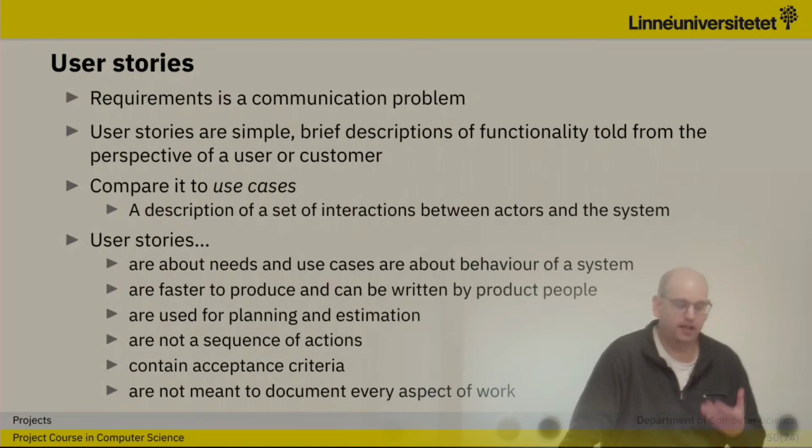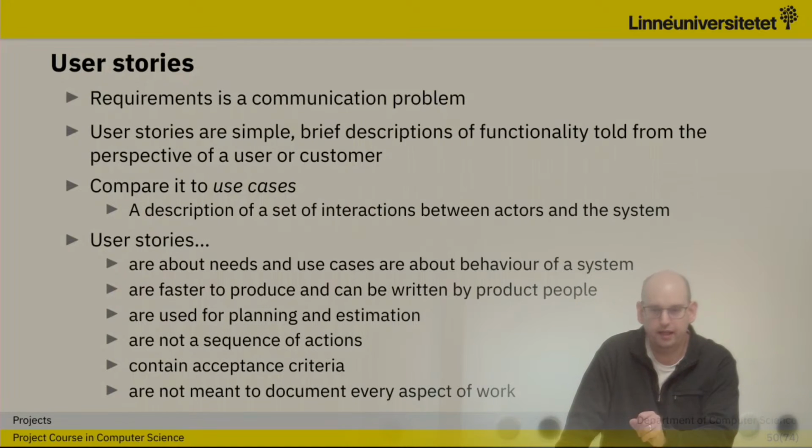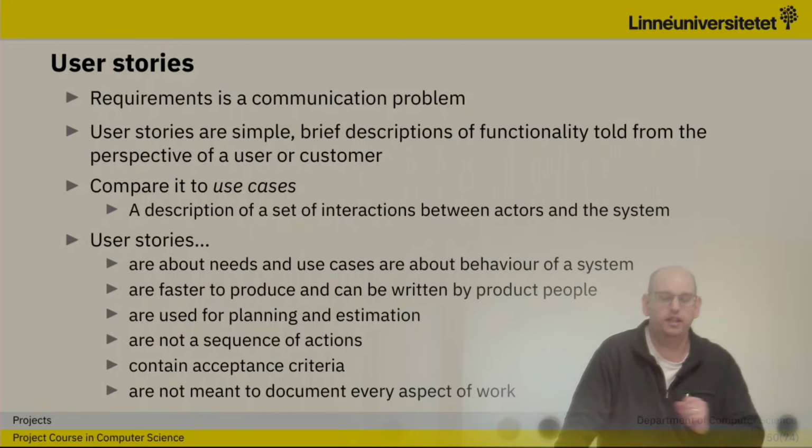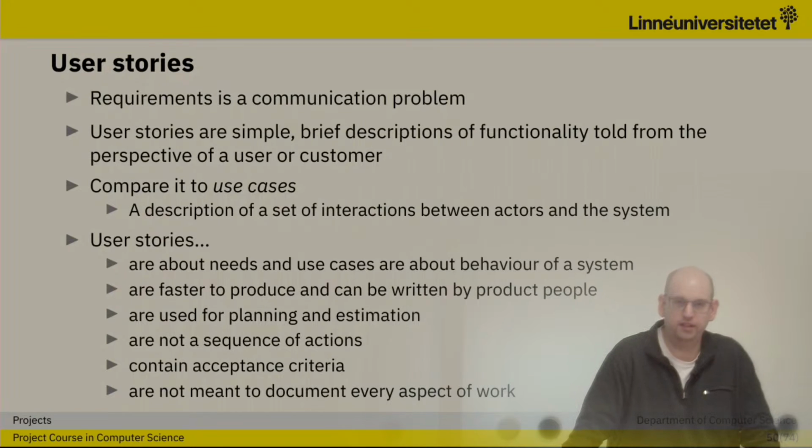If the user story is, as a guest, I want to be able to make a reservation, we know that this is done when the user has filled in all the required information and the table where they're going to sit has been reserved in the system. We can then tick that one off and say, we're done with this, and move on with the next.